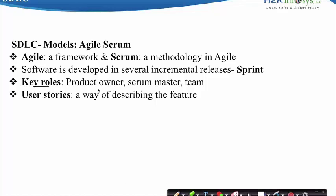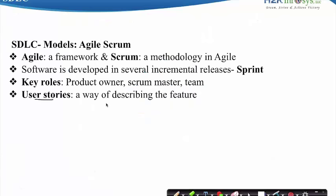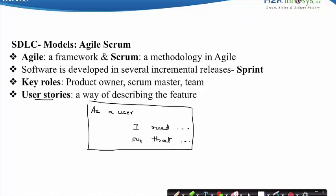There are three key roles in Agile Scrum. The Product Owner defines features needed in the product and provides ideas for the project. The Scrum Master protects the team and process, and is responsible for running the meetings and keeping the project going. The team develops the software and involves the BA, the developer, QA, and so on. User Stories are a way of describing a feature in the format: 'As a user, I need something so that a certain thing can be achieved.' User Stories allow Product Owners to specify the right amount of detail for the team to estimate the size of the task.